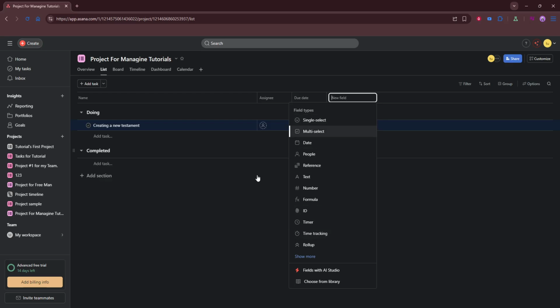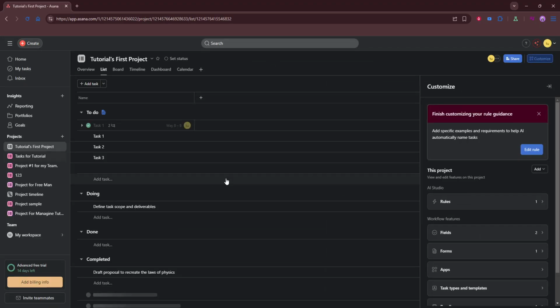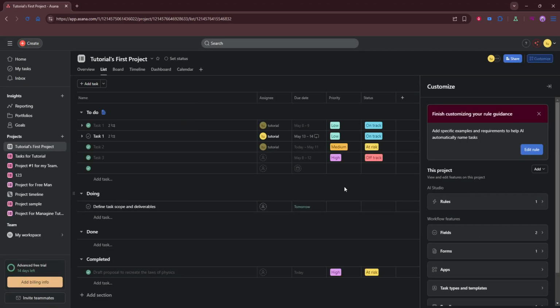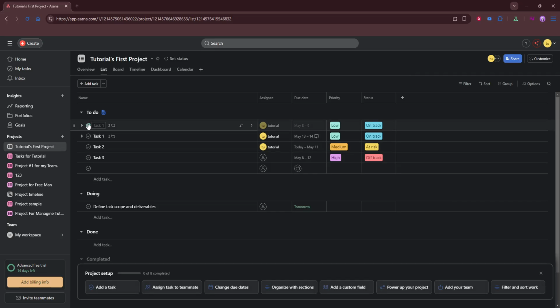are smooth. Use comments, files, and status updates to keep everyone aligned. Post decisions and questions in the task's comment thread so the full history lives in one place. Attach relevant files to the task rather than scattering them across tools. Update status fields consistently, using labels like not started, in progress, blocked, or done so teammates can scan and understand what needs attention.